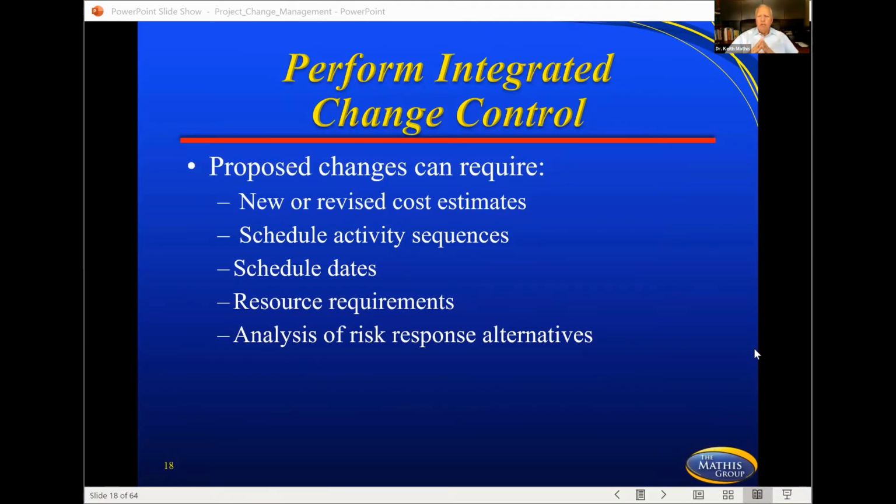Now, if you have already done your risk analysis and you have your project plan out and you're running your project as most projects would be functioning, and the customer wants a change request of new work, let's say it is new work, that's going to require a risk analysis for that new piece of work. You have not done a risk analysis on that new work that you're adding, so you're going to have to at least look at this.